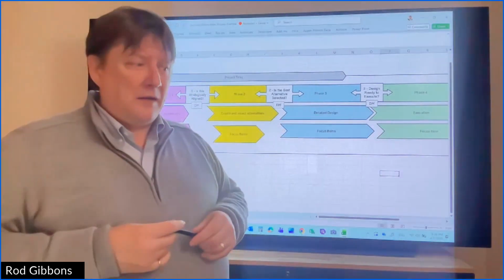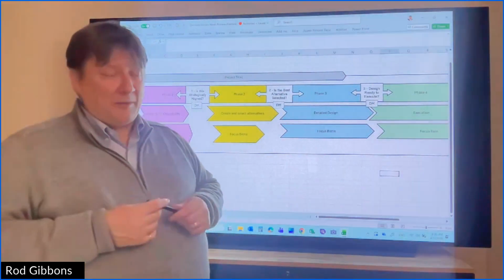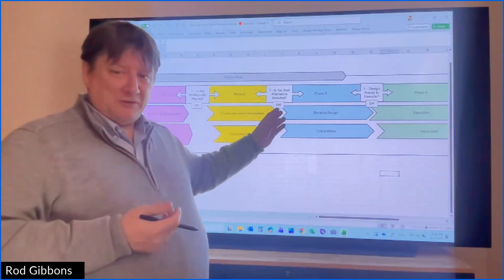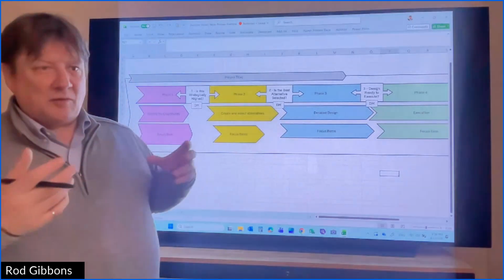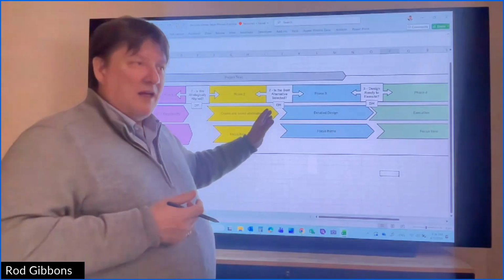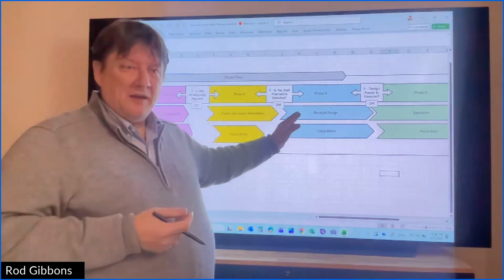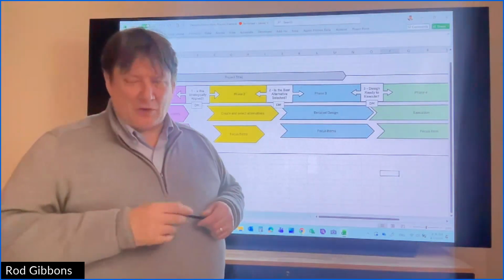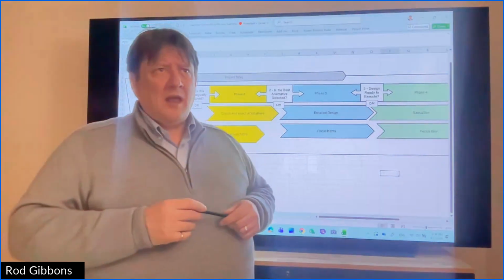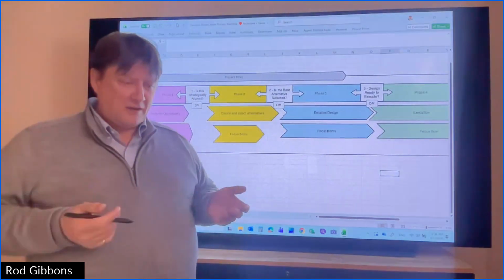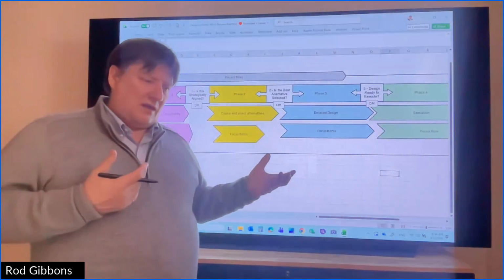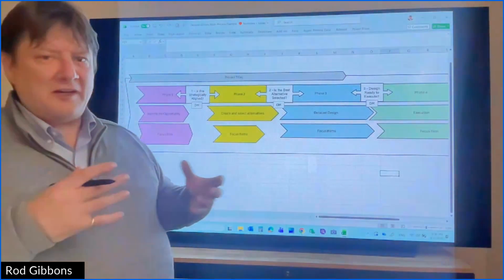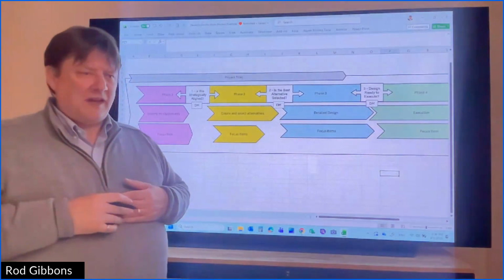When it's a large team like that and not everyone is aligned, two things will happen. Either it'll probably get recycled back for the project team to do more work to satisfy the subject matter expert or the person who's not on board, or, if it's more of a minor issue, it could be, okay, 9 out of 10 things are answered, keep going, but you still have to finish off this one item. So it's noted as a finding. You go through the gate, but you have a finding. But again, if you know who your decision makers are, if you know who the decision review board is, it usually is fairly unanimous, or there's a general feel of whether people are comfortable going with the decision or not.